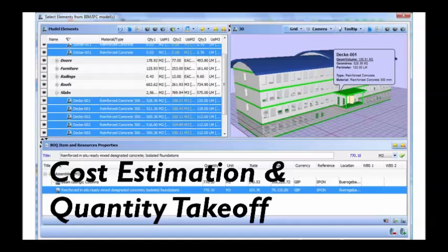Now, roofers typically refer to the number as a square, and it's 100 square feet. So every 100 square feet is a certain amount of money. But when we're looking at this, each individual material is going to have its own quantity takeoff and its own estimate of cost. And when you get the entire cost estimate back, it's basically adding up all of those individual line items of materials.